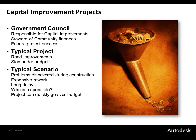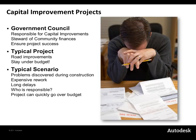Now at face value, this seems like a relatively easy task. However, even the most straightforward projects can get financially out of hand very quickly. This is because problems typically arise during the construction phase, which require rework and cause delays. Because this translates into additional fees, someone will be responsible for the extra charges. As a result, the project can very quickly go over budget.